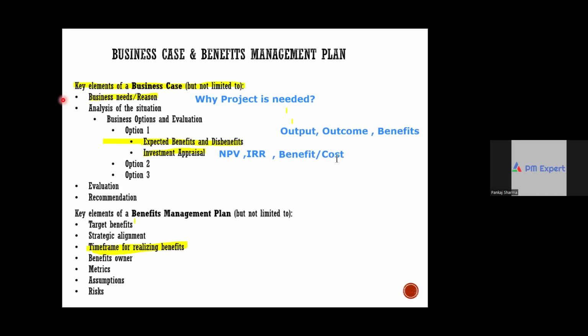See, 5/4, right? 5 benefits, 4 cost, let's say. Or 9/5. Cost is more, but benefit is also very high. So 9/5 is better, right? So yes, cost plays a lot of role, but again, it's the overall benefit to cost ratio which is seen in such projects. In profitable ones, it's easy because if the benefit is more, my tilt would be towards the benefit. But again, these are projections, right?